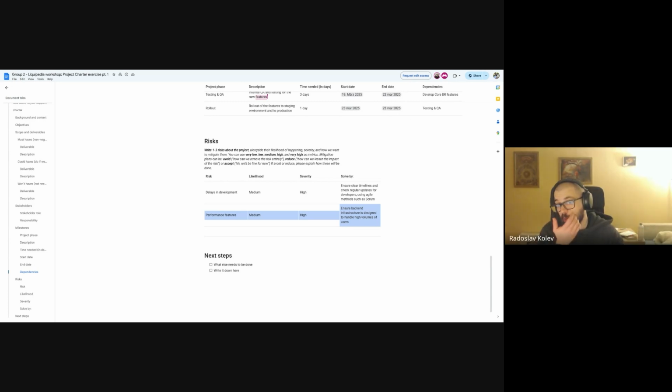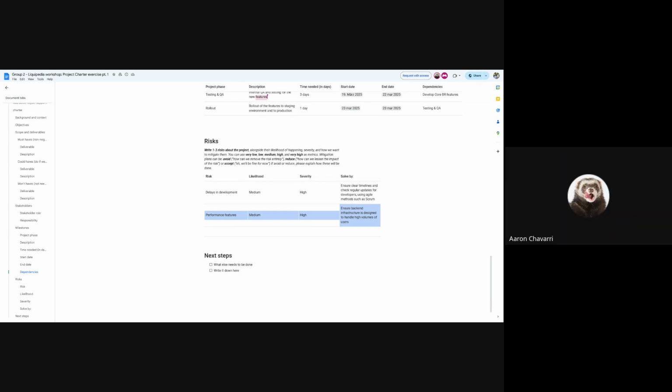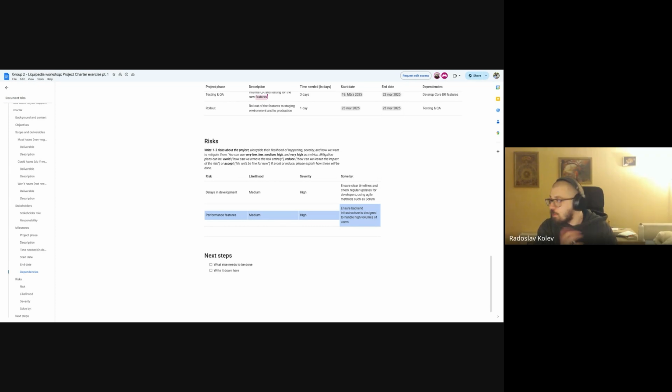I would say especially the performance feature is a risk that you should definitely consider. For example, you say we're releasing Apex, PUBG, and PUBG Mobile on the same day to all of these interested markets. Imagine all of India opens PUBG and PUBG Mobile. It's not realistic, but say it happens. It is a risk. Medium, pretty accurate. If a huge flux of users come in, it could break.